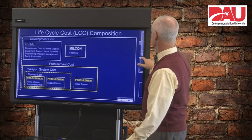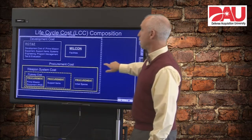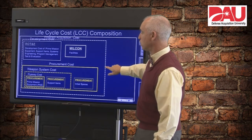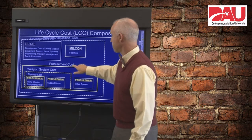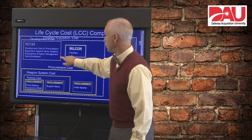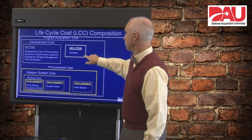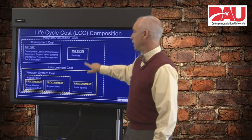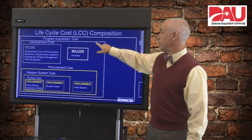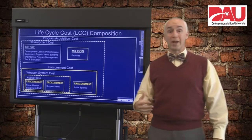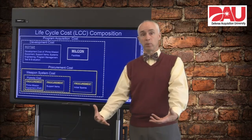To get another type of cost that we talk about — the program acquisition cost — you put all of those things together: your RDT&E development cost, anything for military construction, and your procurement costs. Put all of those together, and that is what we call our program acquisition cost. So that's the total cost of acquiring that program.